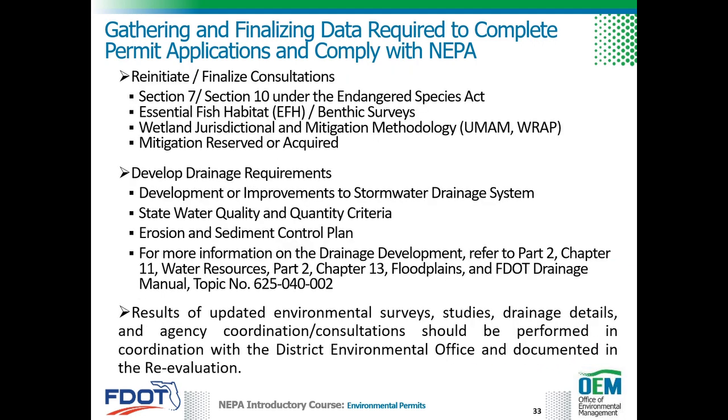In addition, FDOT will need to reinitiate and/or finalize consultations such as Section 7 or Section 10 under the Endangered Species Act, the Essential Fish Habitat or benthic surveys, wetland jurisdictional and mitigation methodology, and present the mitigation reserved or acquired.